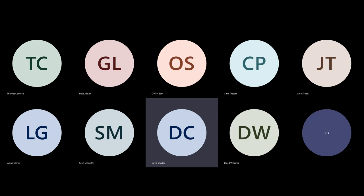So GPR, if you get the good stuff, still doesn't work very well. It can work brilliantly, but the problem you've got is that, you know how I said the ground's changed above a lot? Well, that's happened not just to drainage, but to all the other services. We keep finding 6K6 cables everywhere where we weren't expecting them. We're still finding power cables where we weren't expecting them, gas mains, water mains, everywhere. And the problem is that when you do GPR, it finds everything.